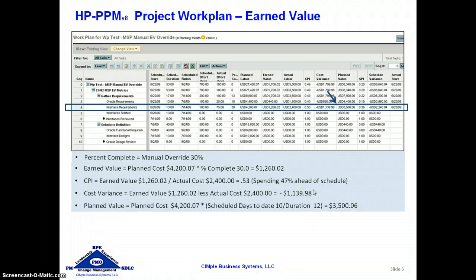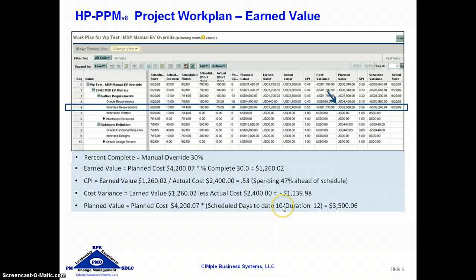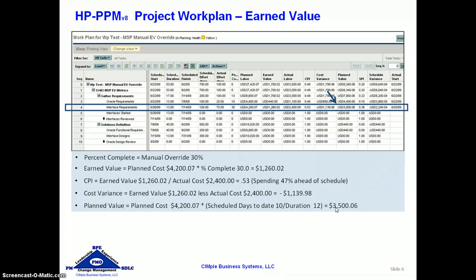The next value is the planned value. The planned value is a little different — it's not impacted by the percent complete. It's based on the assumption of a flat cost spending profile, so your planned cost of $4,200 total is multiplied by the number of days you are down the task path divided by the number of work days in the task. This is based on the regional calendar and work days, so holidays are excluded. We are 10 days down a 12-day work path, so based on that we should be at $3,500.06 in spending. If you planned it that way it looks reasonable, but you are behind schedule if you're committing to finish at 100 hours and $4,200 — though without knowing the details, that's a huge leap of faith.